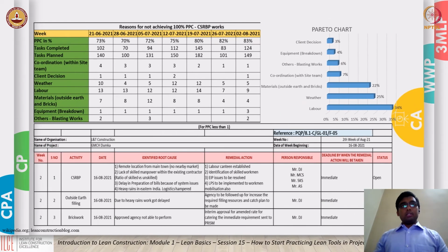All the constraints that are noted down are subcategorized into different headers. Then the Pareto chart is prepared. The Pareto principle states that for many outcomes, roughly 80% of consequences come from 20% of the causes. Other names for this principle are 80-20 rule, the law of the vital few, or the principle of factor sparsity. In individual cases, the distribution could just as well be, say, near to 90-10 or 70-30. This helps to eliminate waste due to overprocessing.